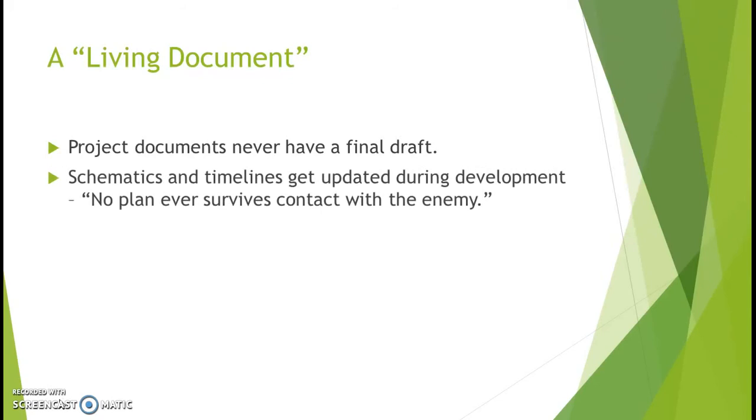Okay, when I say your product document is a living document, what I mean is that you really never have a final draft in an engineering firm. Until the end of life of your product, your schematic and timelines keep getting updated, and usually they become, in fact, the first draft of version 2.